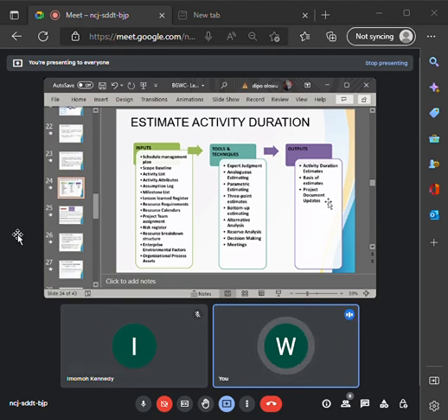Basis of estimate is simply the explanations backing up that estimation. Say, for instance, somebody gives you an estimate of 5 days to complete a task. You're going to ask, how did you arrive at 5 days? What is your reason for these 5 days? That explanation the person will give to you to help explain why he chose 1 day, 2 days, 3 days is what we refer to as basis of estimate.